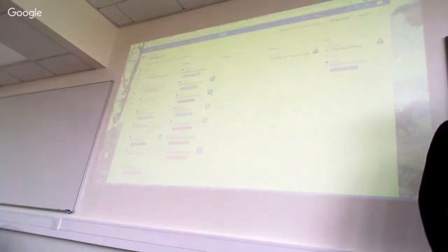Not everything. But I think we kind of used it wrongly as well, because we pretty much pulled everything we made inside there, because we didn't have the sprint planning meeting ahead, so we kind of did it underway in the sprint. Okay, so whatever you decided, you put everything in the sprint without thinking whether you'll be able to finish or not. Pretty much. For this sprint, yes.